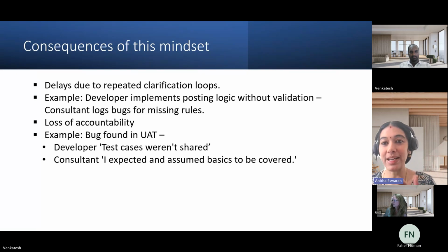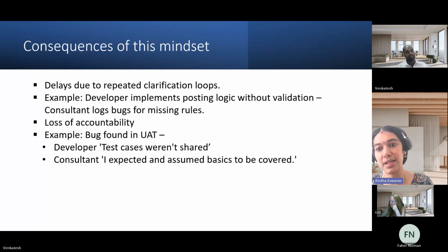For instance, if you enable dual write in your environment, Venkatesh, not all the data import processes would work smoothly. I have faced in many of my projects where the code is working standalone in the dev environment or the higher environments where dual write is not enabled. But when we promote the changes to such environments, we see that the process is not working. Then the first question I ask is whether any integration is enabled. For instance, dual write. Would you please pause the dual write for a moment and see whether this particular process is working? Yes, that works. Then we need to identify how we manage this.